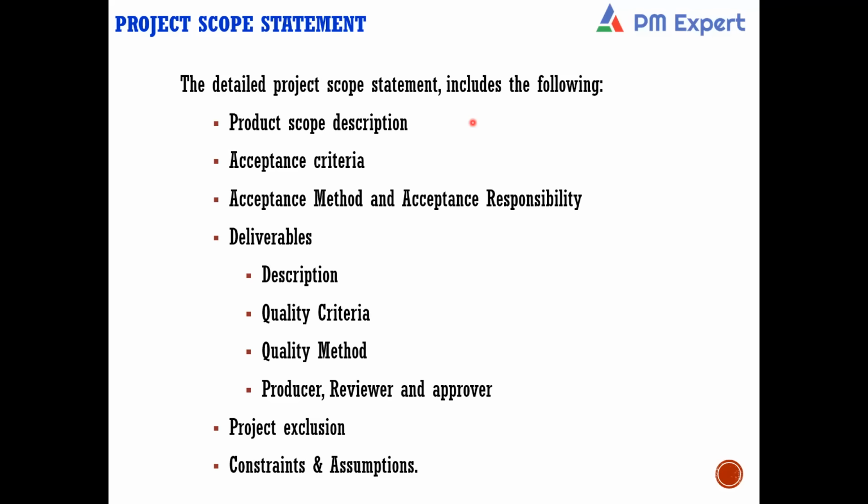So scope contains those requirements that will be delivered by the project. In fact, scope creates a boundary, right? For example, stakeholders might be requiring 100 requirements, but the project is constrained by time and cost. So within that constraint, you might be able to deliver only 50 high priority requirements. Those 50 high priority requirements that you have to deliver as a part of the project represent the scope of the project. Is the difference between requirement and scope clear?